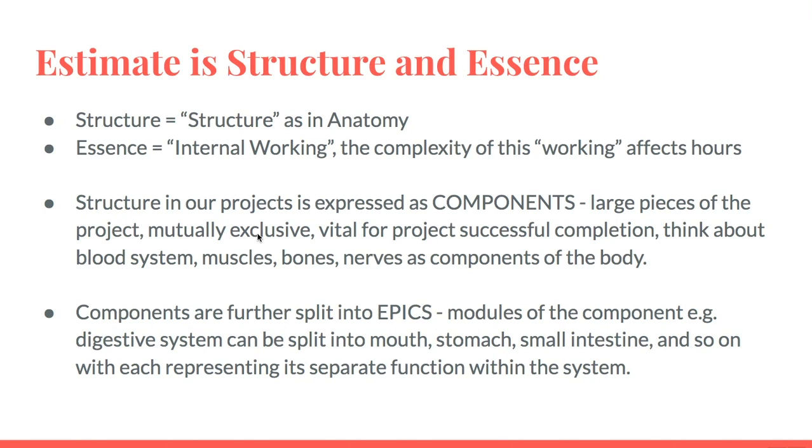Structure helps you to avoid this single-piece type of estimate, like a project, 50,000. So how can you structure a project into 10, 20, maybe 100 elements? That's what front end, back end mapping and understanding of features helps you to do.